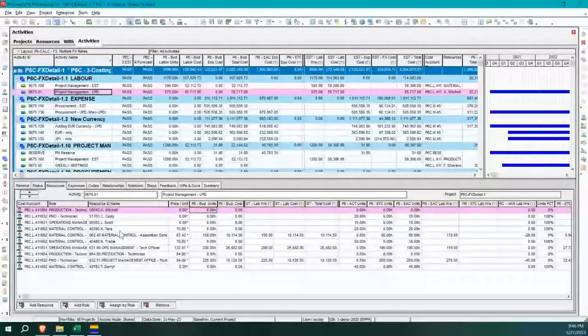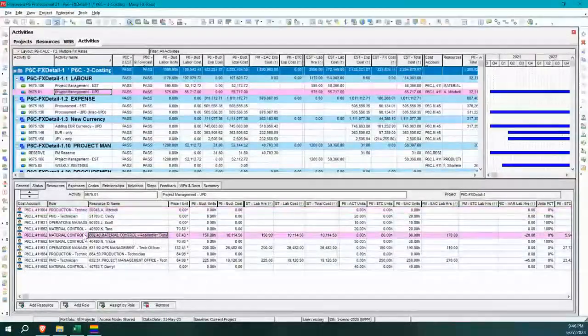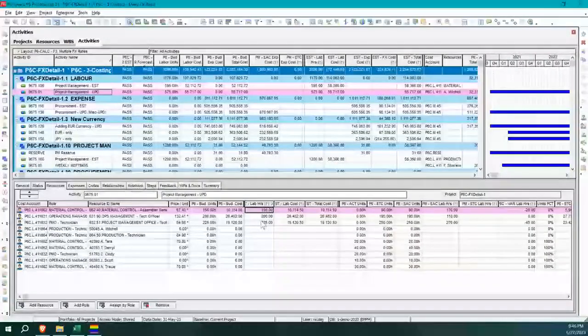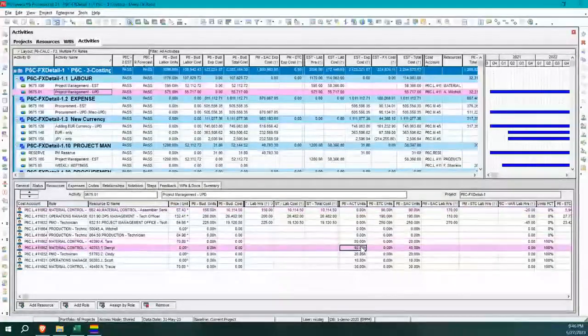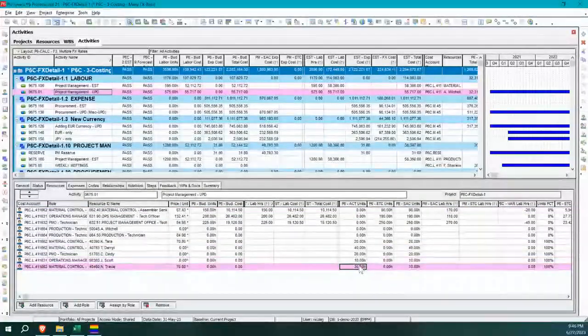So now, how the heck do we do our updating, and how do we look at our earned value when we are not putting all the update hours to the original estimate? Okay, so these were the 3 that we had originally, but now we have all these other folks that charge to the project, and maybe that's legit, and maybe they made a mistake on their timesheet. Okay, so those are other things that having this detail can help you with. But you can see that they've charged hours, so these are actual hours that have come through the system.